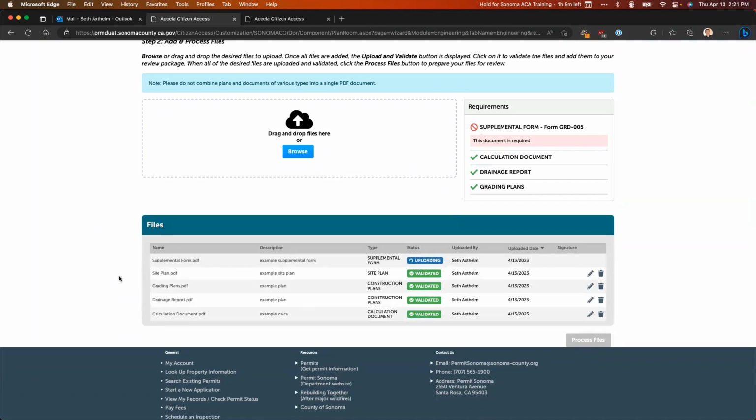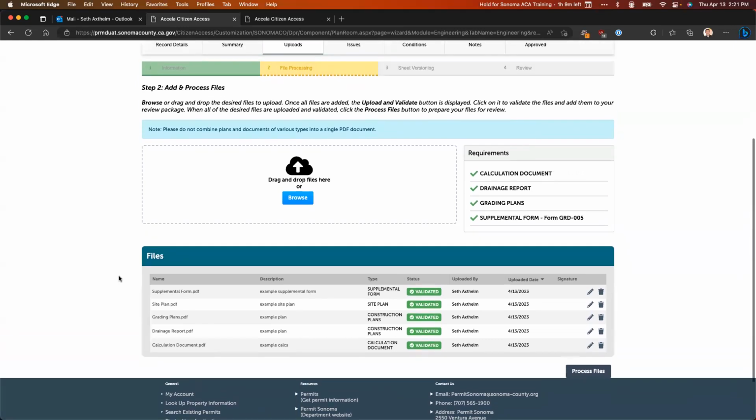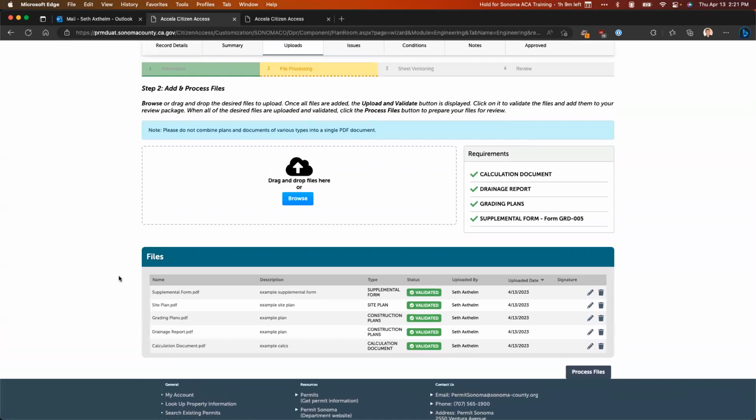There is a limitation of about 100 characters, I believe, and that's not a plan room limitation. That is actually a limitation in the Excel software. So try to stay within 100 characters if you can. And whenever possible, it's always best to try to avoid special characters in the file name. Things like extra periods or ampersands, things like that. So try to avoid as many special characters as you can in addition to that.